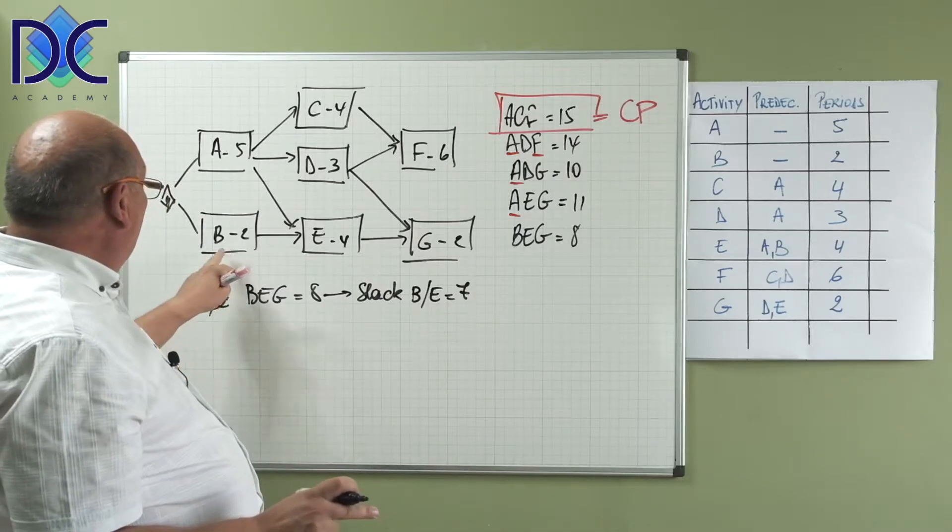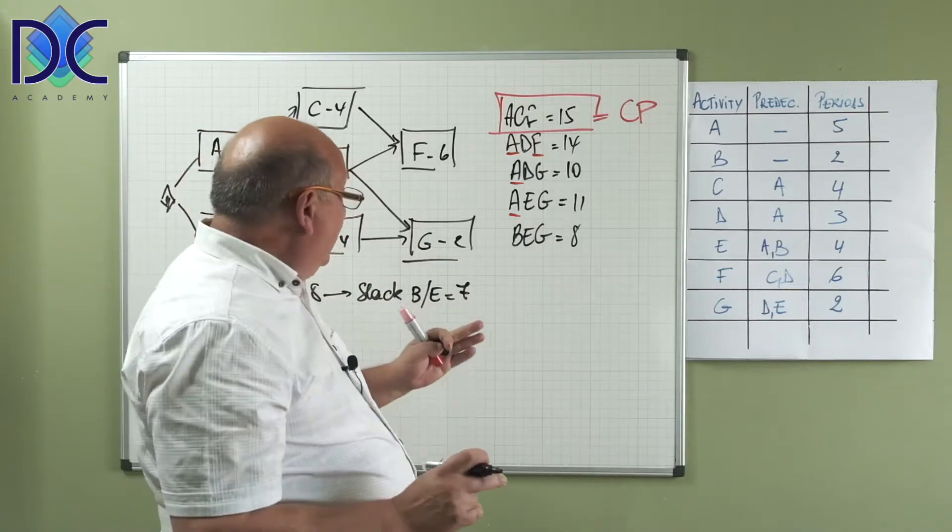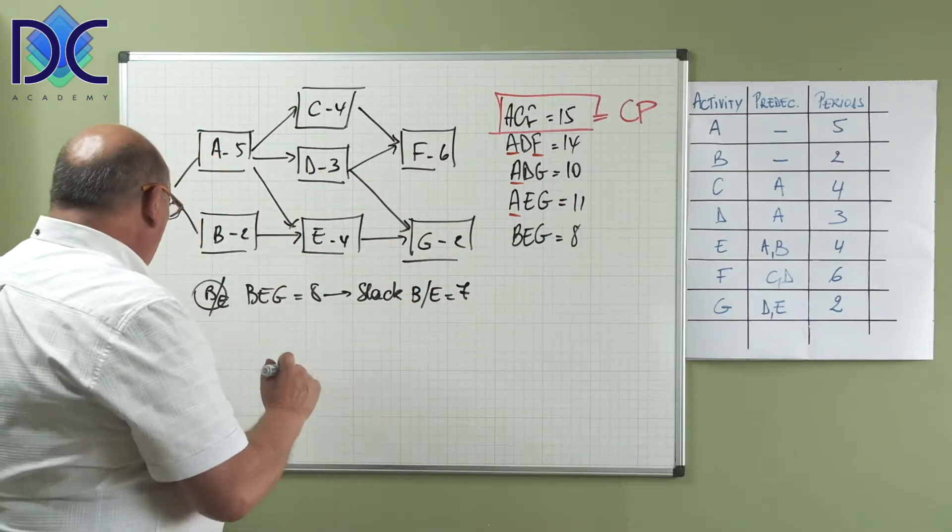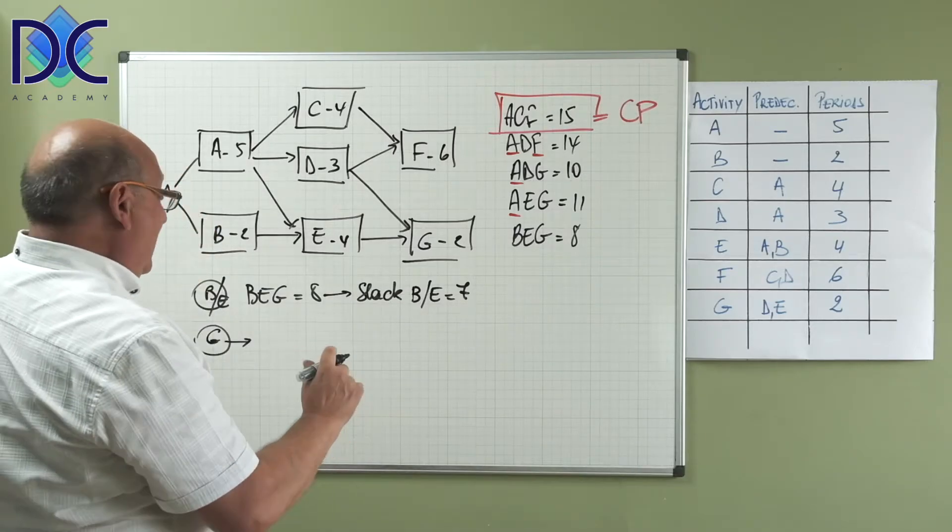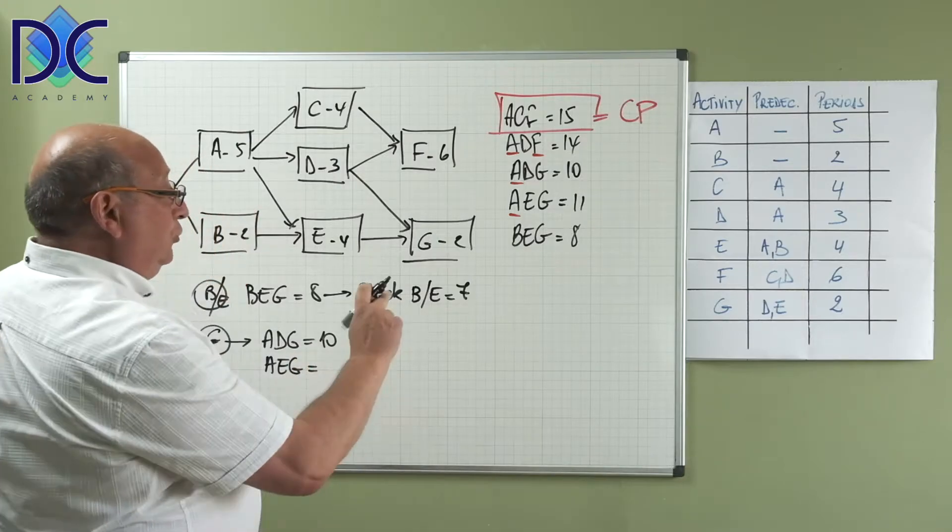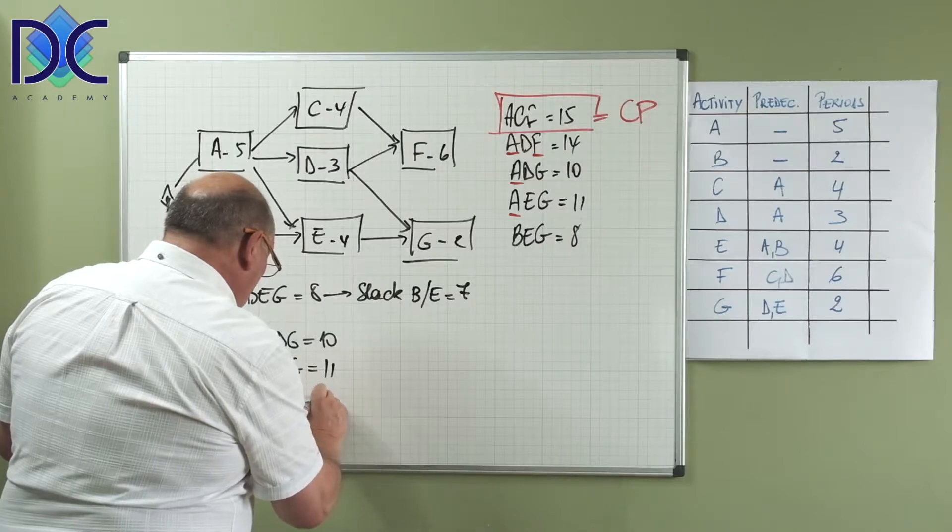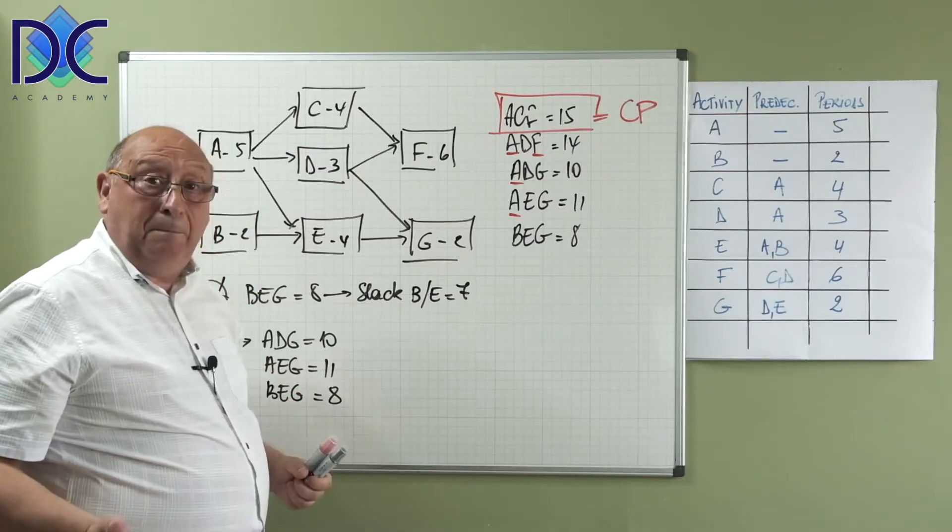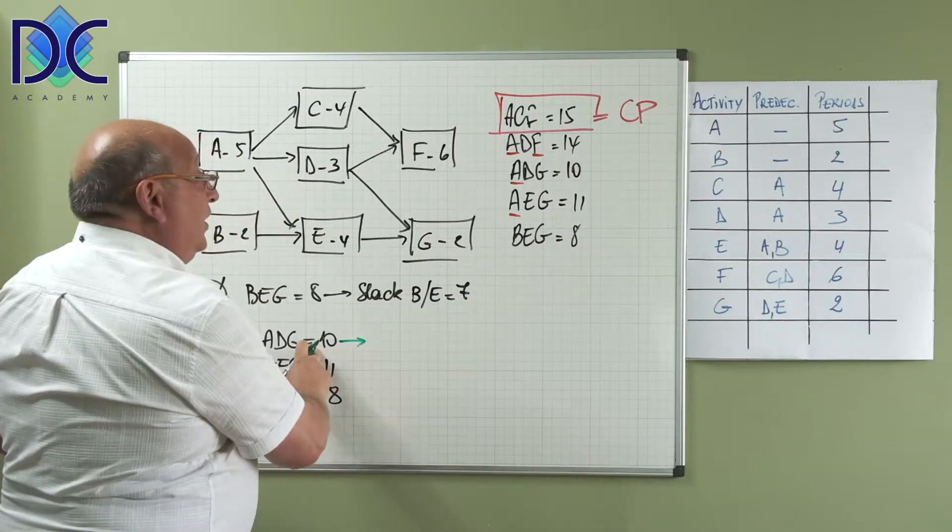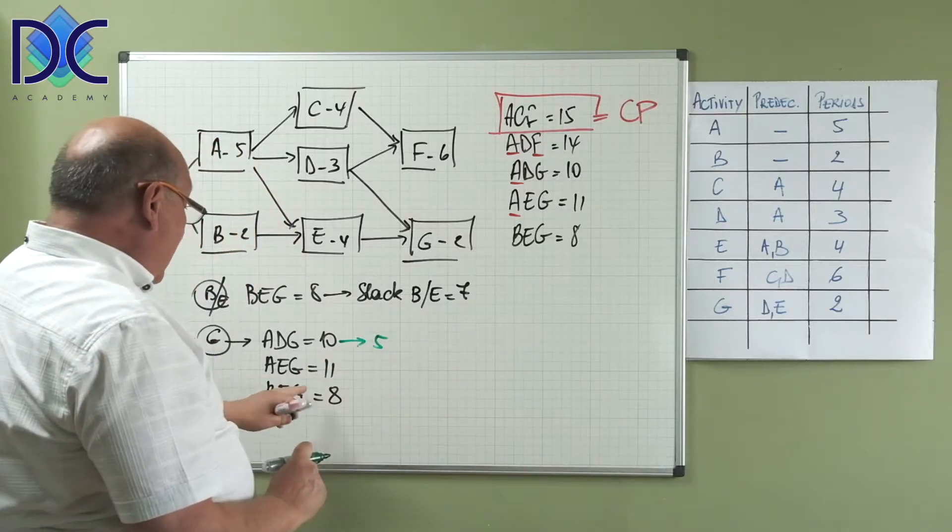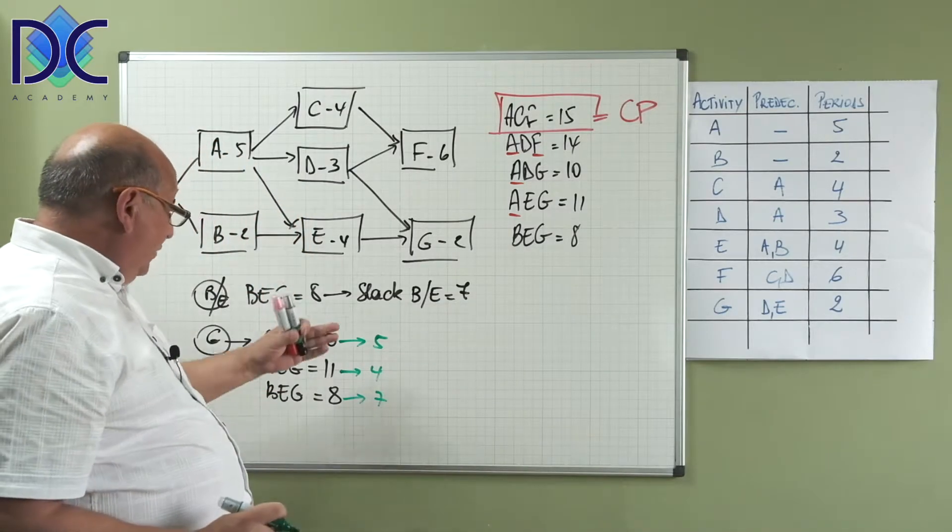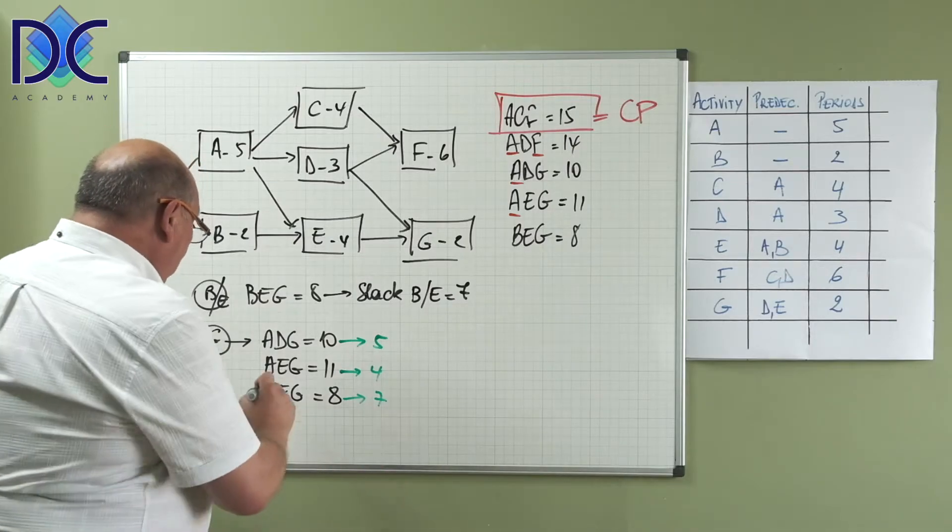Now we have to be careful here because G is on three paths. For G, we have to look at the paths ADG which has the duration of 10, AEG which has a duration of 11, and BEG which has a duration of 8. When I compare each of those with the critical path, I see that here G would have 15 minus 10, a slack of 5. Here I would have a slack of 4, and here I would have a slack of 7.